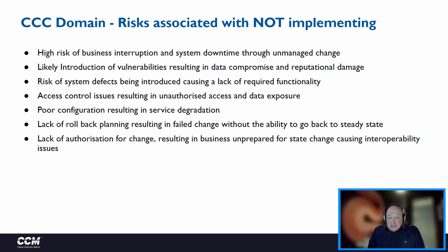The high risk of business interruption through unmanaged change, as I just mentioned: you could introduce vulnerabilities, system defects could affect performance, access control issues resulting in unauthorized change from people who weren't on the change board, poor configuration resulting in service degradation. And, as a reference, the lack of rollback planning.